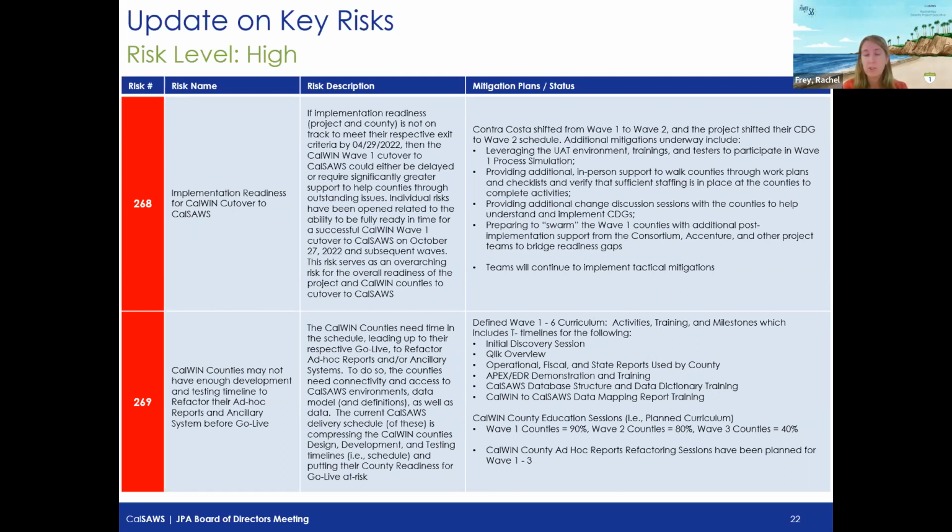And this is where we have defined a contingency plan in the event that any of these risks were to come to a point that were not recoverable. It is good project management to have a contingency plan in place. It is something that we have in our back pocket, but at this juncture is not something that is needing to be executed, as the risks that we have are trending in a place where the project is moving forward. So we still have this, but it's a way for us to track the contingency plan and if we need to make changes to it.